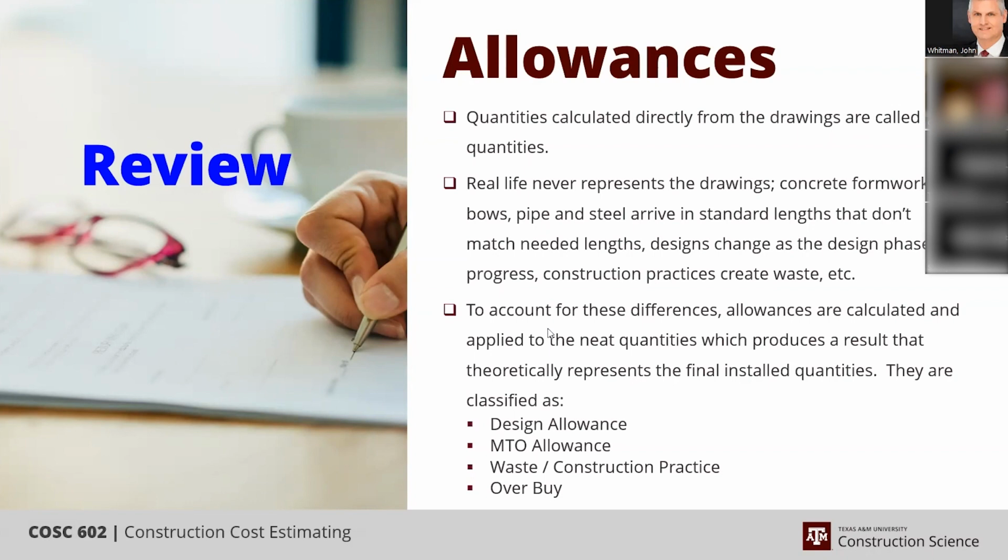The design allowance for instrumentation and capital equipment, that doesn't apply to the quantity, but it does apply to the value. And it'll apply to the value only. Your labor to install that is going to be consistent, but it's the price that may change if the design adjusts slightly. So again, these are somewhat subjective in their magnitude, but the practice is consistent and objective. Any questions on allowances? Okay.